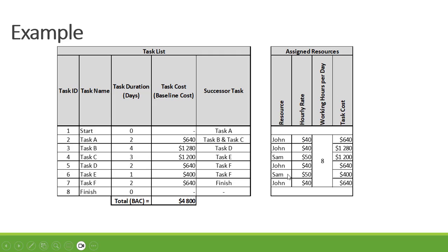Sam is assigned to task E, so it's 50 times 8 = 400, times 1 = $400. And then John is assigned to task F: 40 times 8, times 2 = $640.